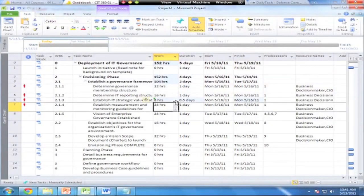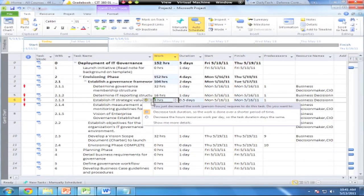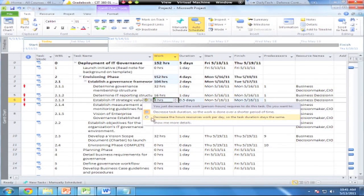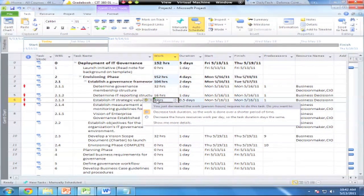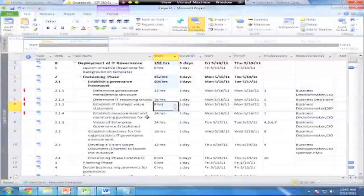Let me go to the work column and adjust the time — if I drop it down to eight hours, a smart dialog box appears saying: you decreased the task duration so the work is done over a shorter period, or you can decrease the hours resources work per day so the task duration stays the same. Project isn't sure how to handle this and wants you to make the decision. When I drop this to eight hours, it drops the task duration down to half a day. I'll choose to decrease the hours resources work per day so the task duration stays the same.